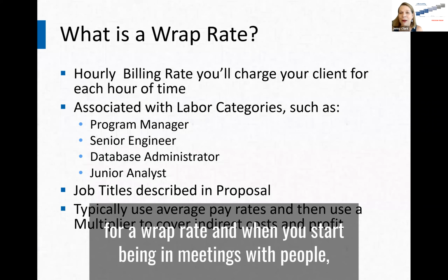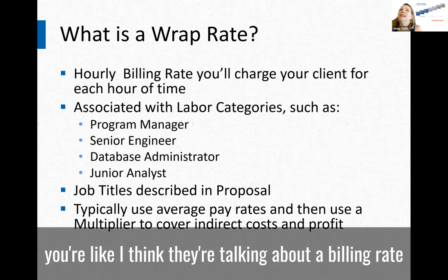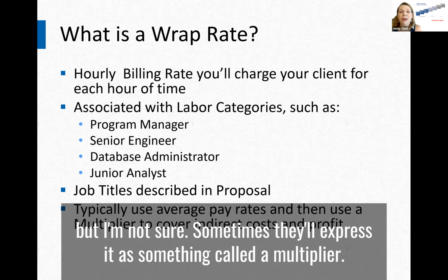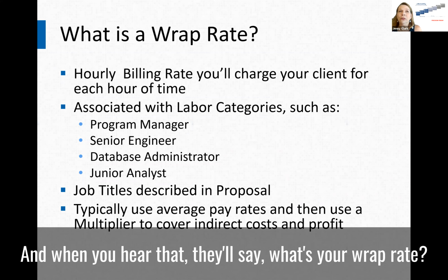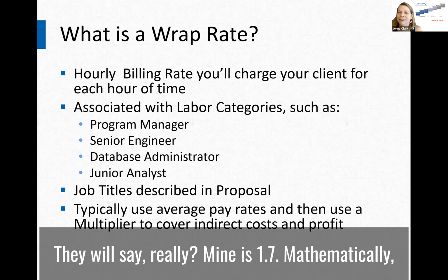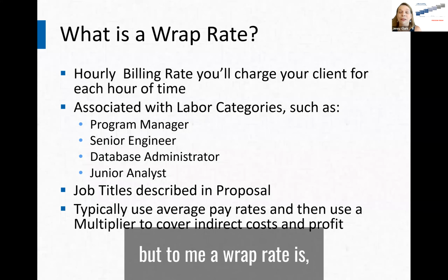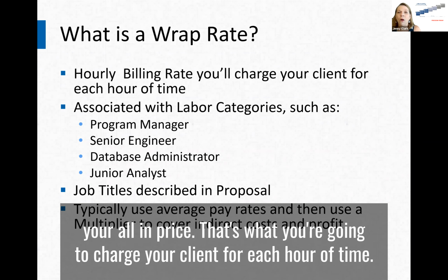There are different terms for a wrap rate. When you start being in meetings with people, they'll use different terminology. You're like, I think they're talking about a billing rate, but I'm not sure. Sometimes they'll express it as something called a multiplier. They'll say, what's your wrap rate? And you'll give a number. You'll say, oh, $97 an hour. They say, really? Mine's 1.7. Mathematically, it's kind of the same thing, but you really need to understand it. To me, a wrap rate is your all-in price. That's what you're going to charge your client for each hour of time.